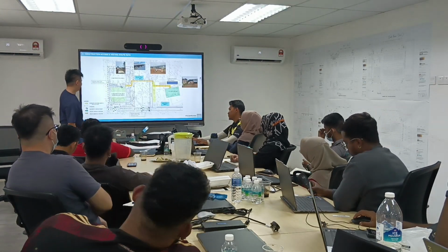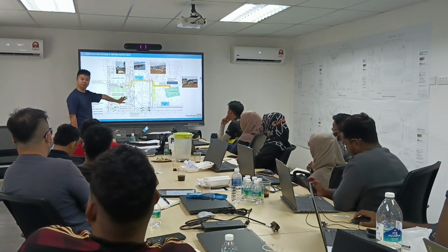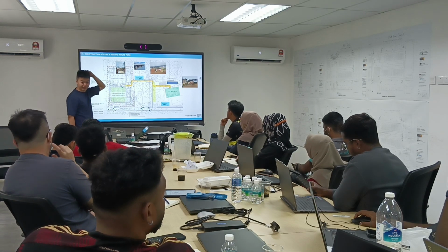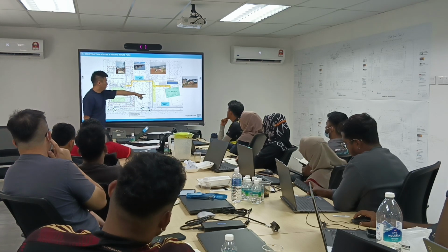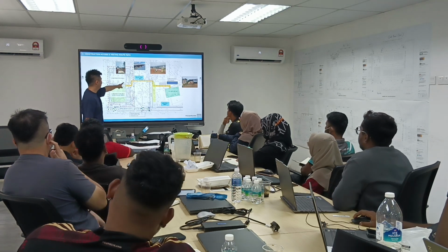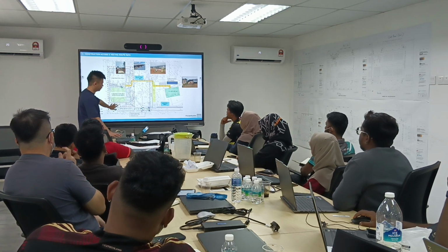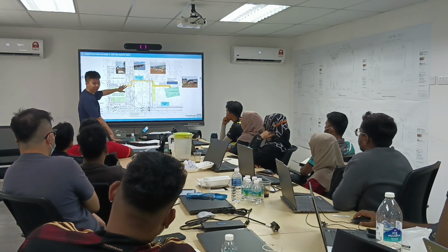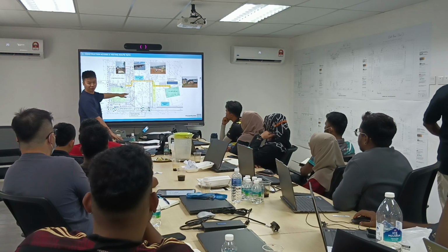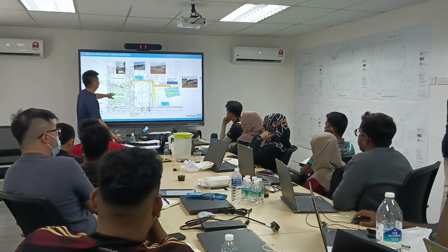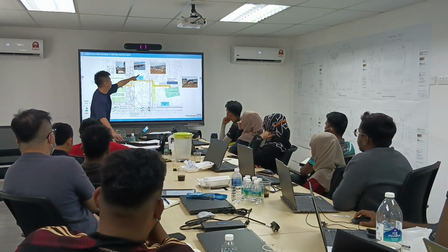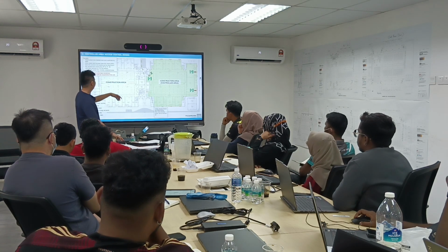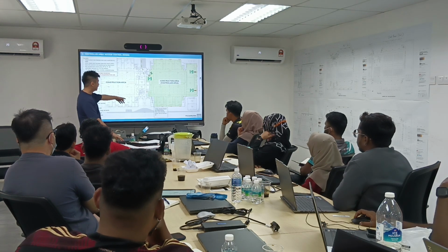So this is our JDC 1. Last round, this is how we briefed the contractor before they came on board. We showed them where the site office is, where the car park is, how to go into the JDC 1 area. I think most of you haven't seen this document because it was lost in transition for quite some time already. We also indicate where the walk path is, etc. And even for the building internally, we also indicate how to go in.